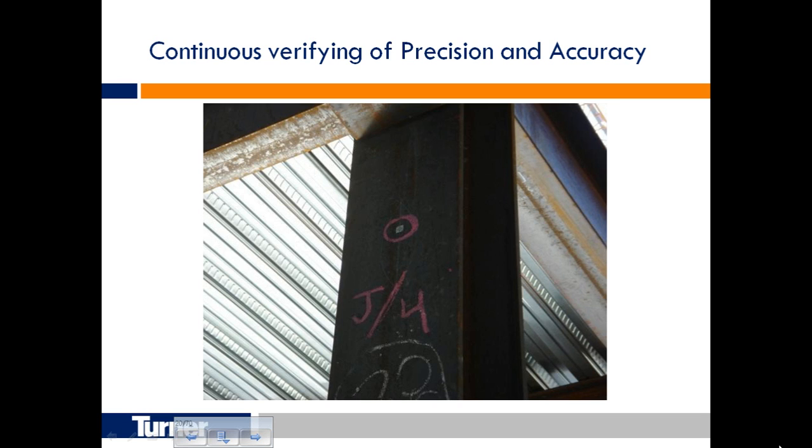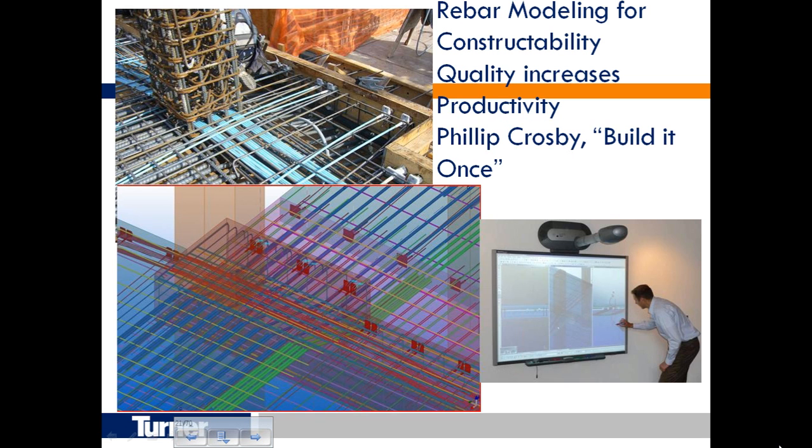The Construction Industry Institute produced a study a couple of years ago with roughly $4 billion worth of work installed and several large contractors that they were working with, and they were able to document roughly 4% of construction costs as rework. And so we really are working at cutting down on that 4% with our quality. This is a great story, I think, for both design and construction.